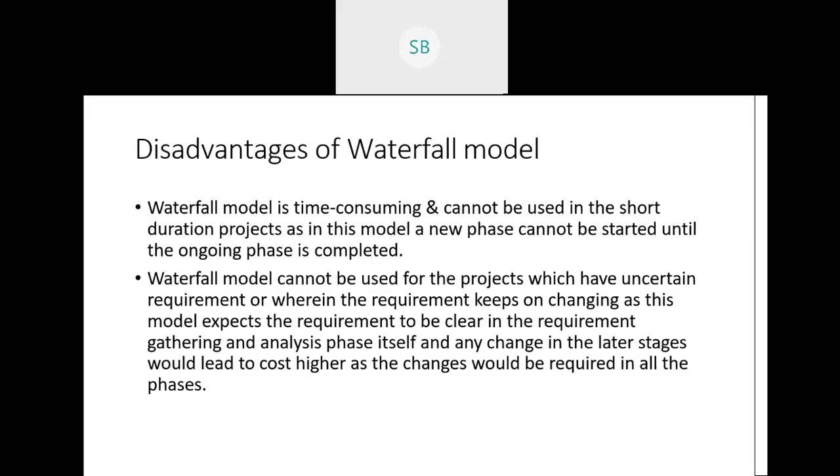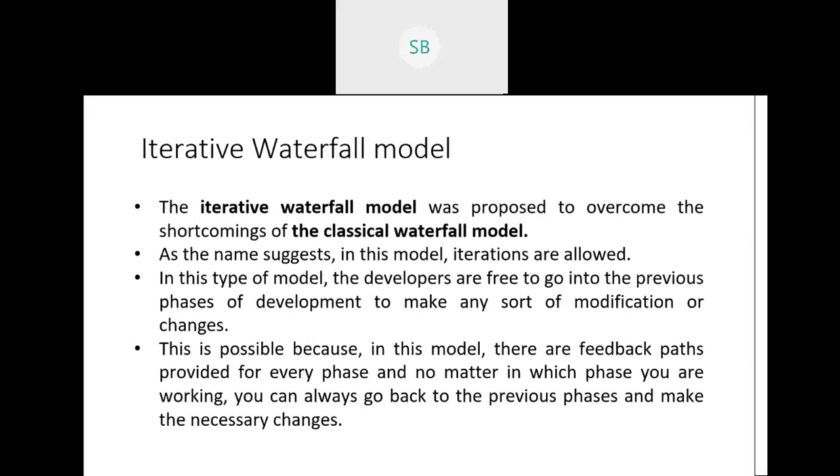That is not possible because in waterfall, one phase finishes, then only we can go to the next phase. If you keep on changing your requirement, everything changes. You cannot modify it here. So that is the major disadvantage of waterfall. To overcome this drawback, we came up with another model, that is the iterative waterfall